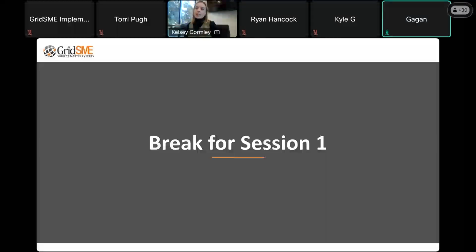Yeah, so what my team is looking for when you start submitting documentation to CAISO is that it does have to be specific to that resource. And for the file type requirements at this time, I don't believe CAISO is accepting PSCAD models for the dynamic or positive sequence load flow modeling that we have to submit in bucket 1 of the CAISO process. So we would be looking for .byd, .epc files specific to that generator. They wouldn't be generic models. Does that answer your question?